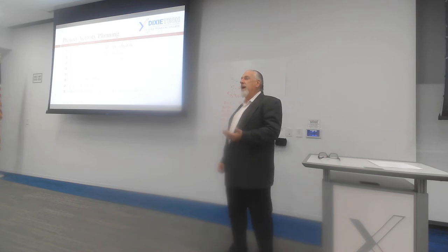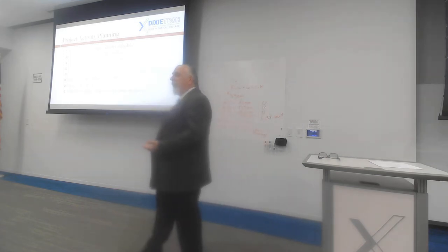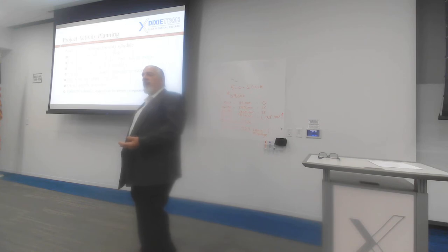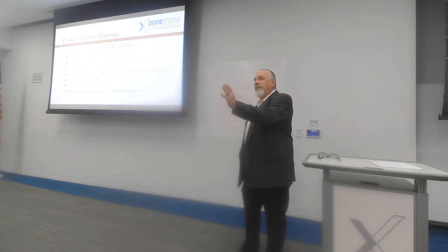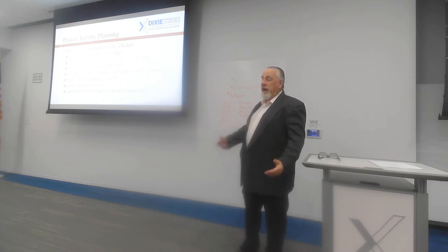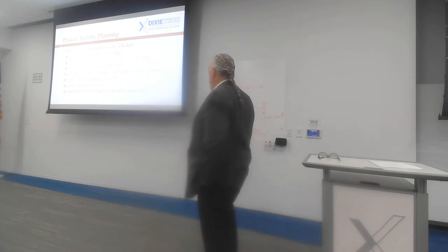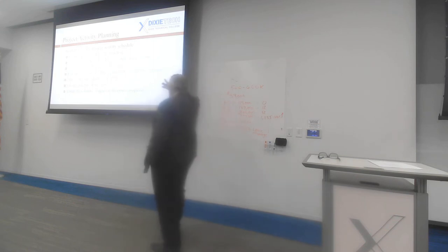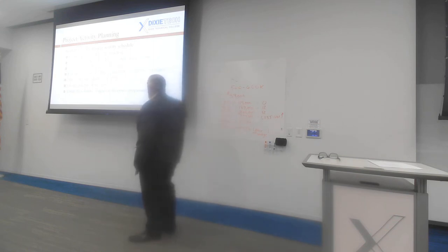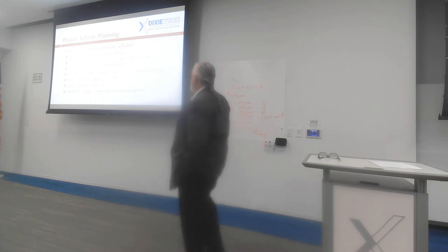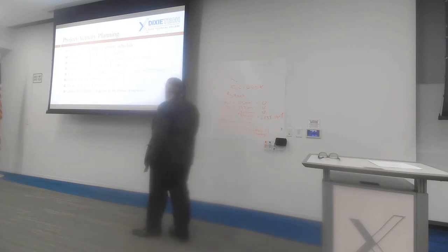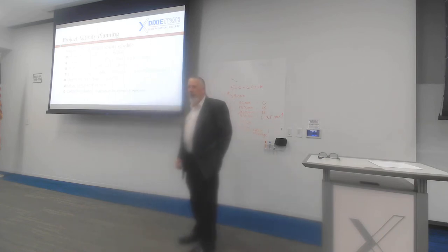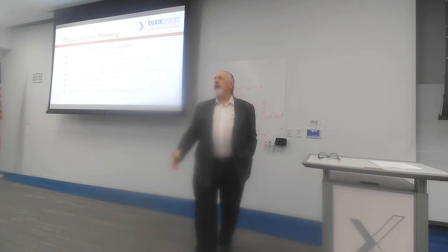So we have to paint the wall and let it dry before you can hang the pictures on the wall or put the shelving on the wall or put the kitchen cabinets on the wall. There are certain precedent activities that have to occur for every project that I can think of. And so we identify those, then we draw that on a diagram, activity on node or activity on arrow. Then we estimate the activity times, and we identify the critical path, which tells us our deliver date.